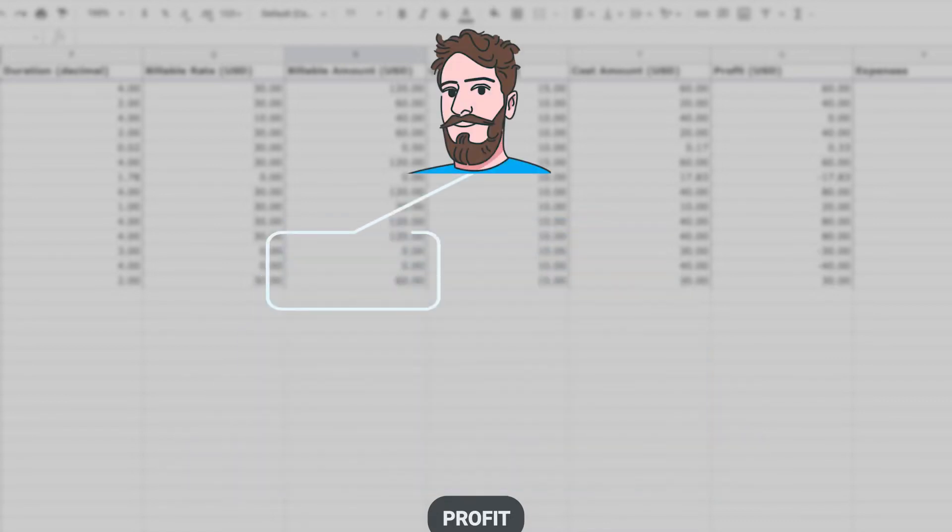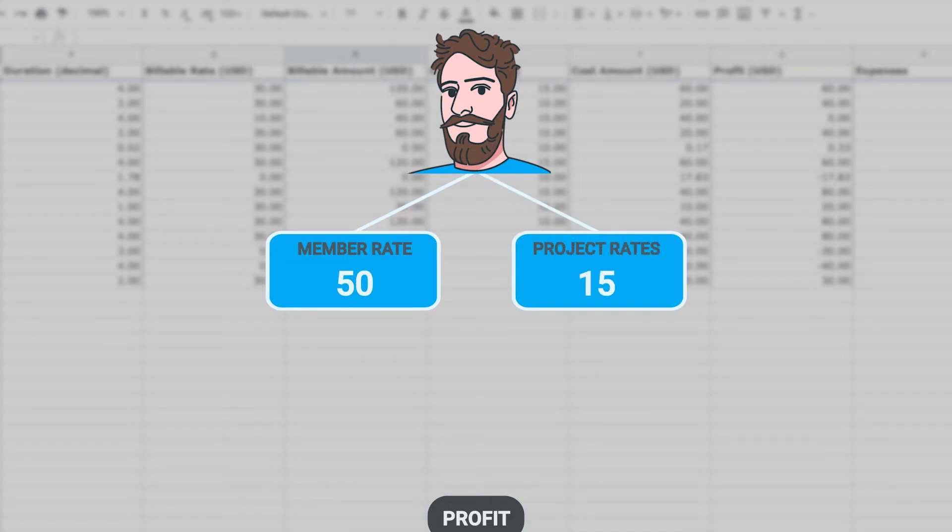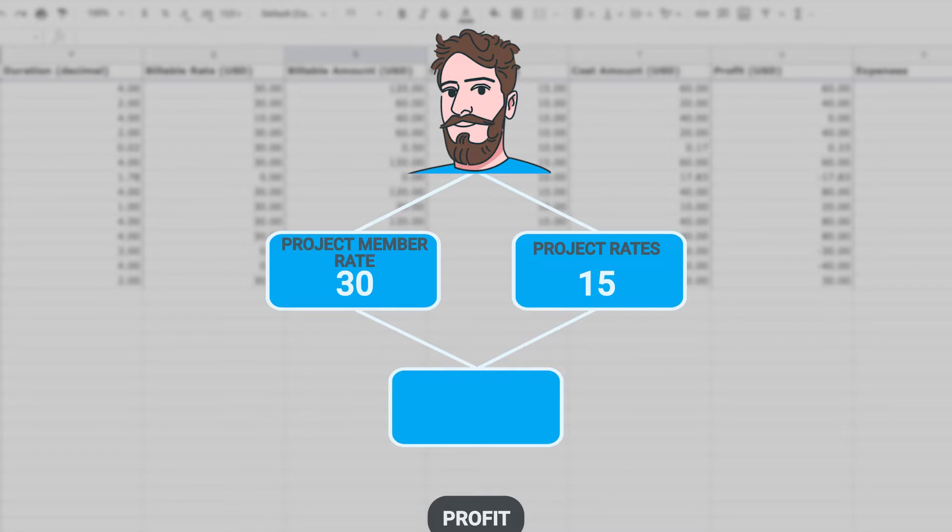So, for example, if this person has this rate and this project this rate, the entry will inherit the project rate. But if you set a rate for that person on the project, it will override the project one.